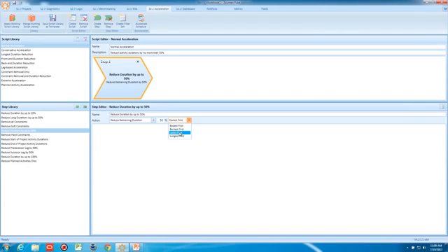What would be a more difficult path to accelerate? A path that had multiple concurrent activities, where multiple tasks would need a duration reduction in order to expedite the finish of the project. So we give you some choices.